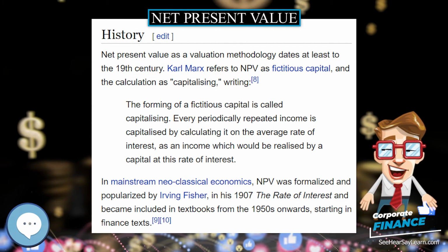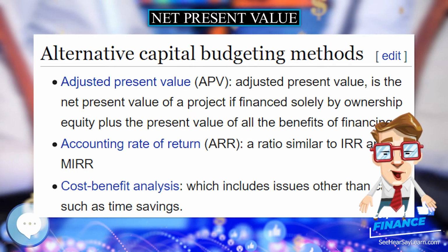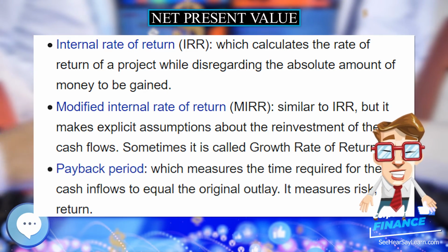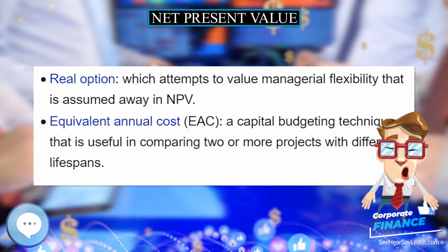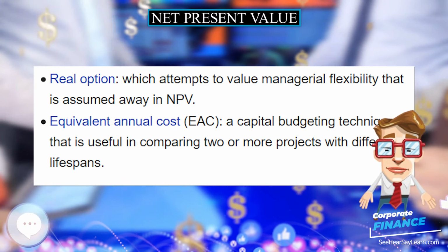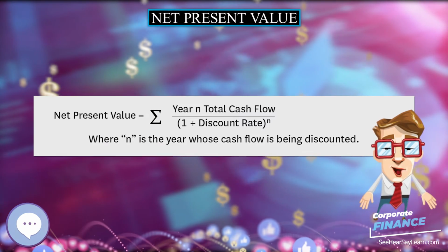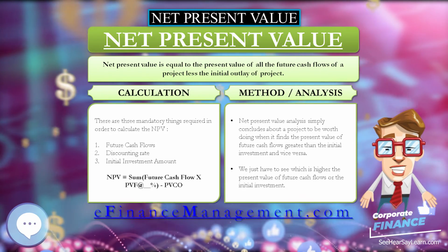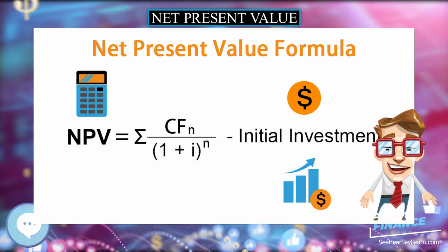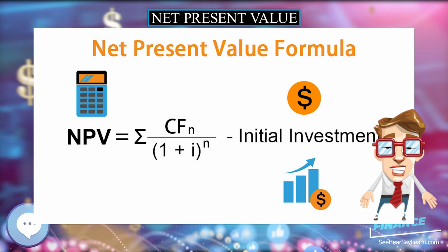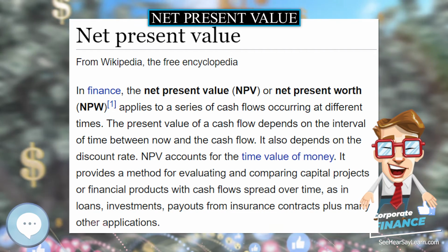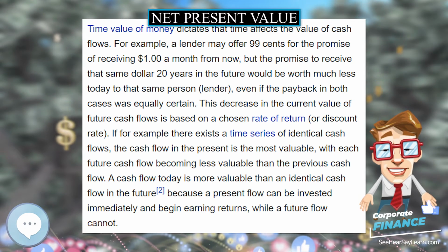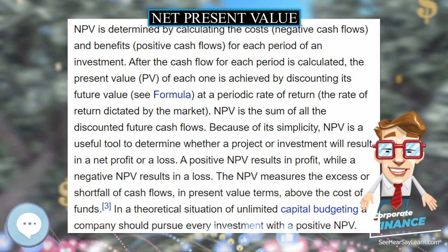Thus, in this example, observe that as t increases the present value of each cash flow at t decreases. For example, the final incoming cash flow has a future value of $10,000 at t equals 12 but has a present value, at t equals 0, of $3,186.31. The opposite of discounting is compounding. Taking the example in reverse, it is the equivalent of investing $3,186.31 at t equals 0, the present value, at an interest rate of 10% compounded for 12 years, which results in a cash flow of $10,000 at t equals 12, the future value.